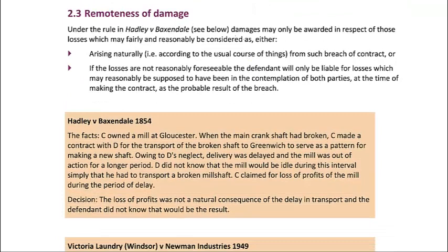So let's look first of all at the remoteness of damage test. Now, there are two key cases here, the Hadley and Baxendale case and the Victoria Laundry case. And these two cases have established that damages will only be awarded if they arise naturally.